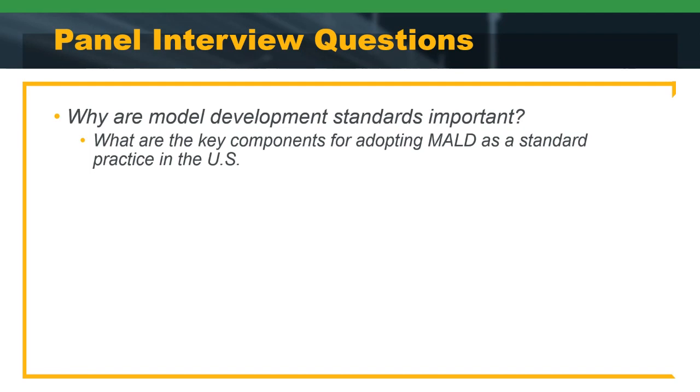And I think the other far right side is to say everything in here is perfect. And I don't know that we necessarily even want to get to that point, right? The engineering teams should be focusing on the engineering challenges. And as Ches discussed earlier, to know exactly what you're at risk for, I have difficulty seeing anybody wanting to say I'm at risk for everything that could possibly be associated with this project, right? And if you think about what's in between those two things, you have moments where you say, I can guarantee that the data in this LandXML file is good for alignments, horizontal and vertical, right? Or I can guarantee that this finished grade surface is accurate to within whatever, half an inch or something like that. And those are the things that I think really do a lot of the blocking and tackling that allow us to be able to get in and utilize that data.